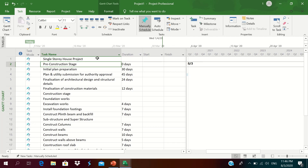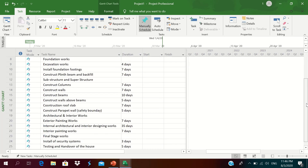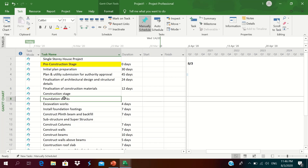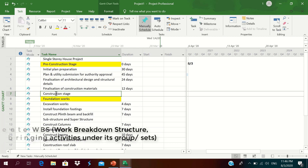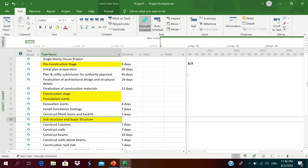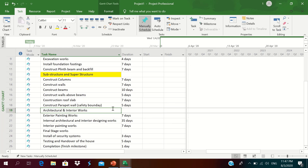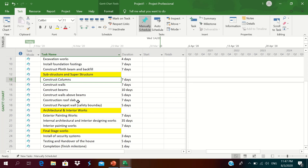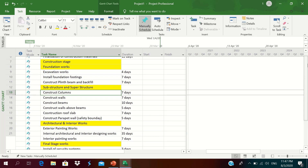The next stage is to link all these activities, but before linking we need to group activities under the WBS. We will format the WBS by filling color. Foundation work is a WBS, construction stage is a WBS, substructure and superstructure is a WBS, architectural and interior works is a WBS, and final stage works is a WBS.